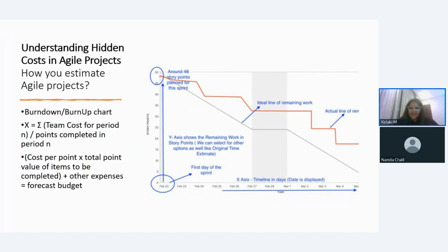Some people also use Gantt charts, but it is appropriate for high risk endeavors with a very low rate of change. When you are all set for delivering value to your customers, you expect that there are going to be changes in the features that they thought were the final features, but when they actually saw the working model in front of them, they realized that they needed it some other way. So it is not a low rate of change that you are expecting in an agile project, and Gantt charts therefore are not very well suited where you are expecting a lot of change in your project.